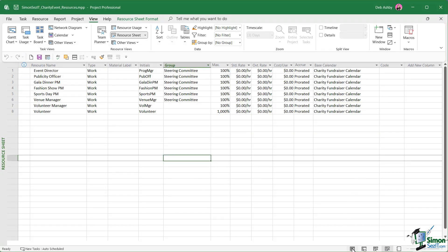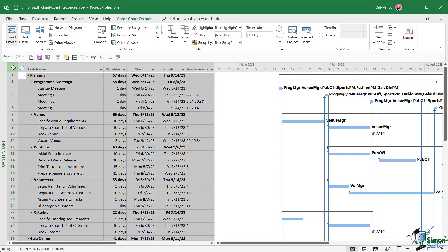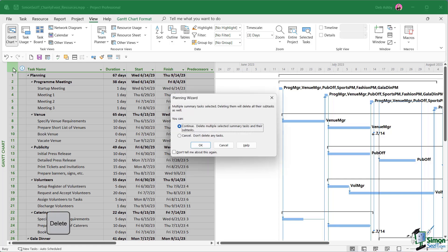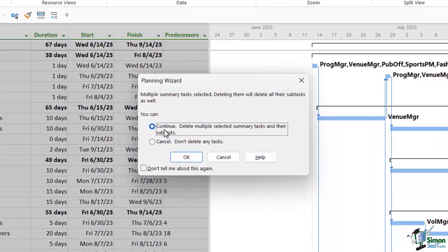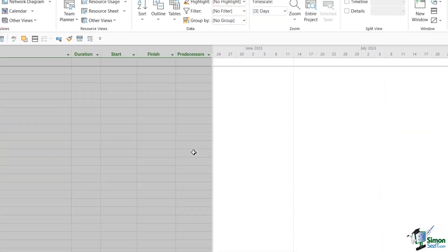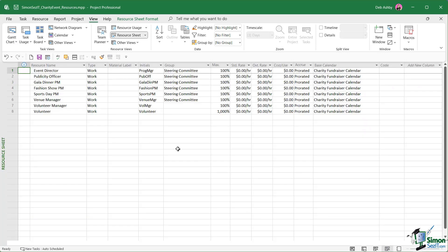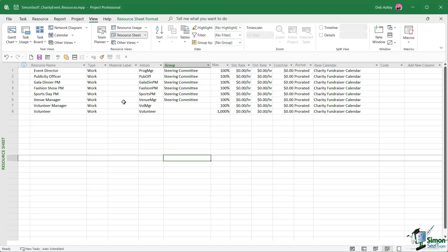We're now working in that file. Let's jump back to the Gantt chart view. We're going to simply remove all of the tasks. If we click on the square in the top left hand corner just here, it's going to select everything and we can simply press the delete key on our keyboard. I'm getting a little warning from the planning wizard. Do I want to delete multiple selected summary tasks and their subtasks? Yes, I do. Let's click on OK. All of those tasks are gone, but we still have our resources listed out on the resource sheet. This is now effectively my resource pool.